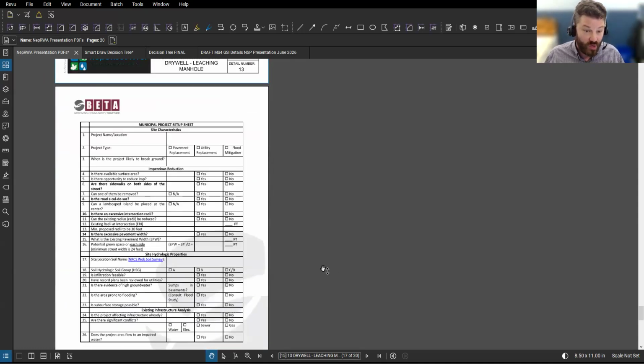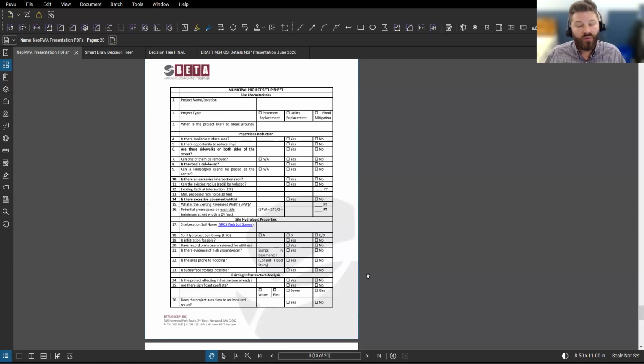We also, as part of this process, wanted a way at the beginning, it's important for the streamline of this, to get out in front of the project. I spoke to some members of the DPW, and they say for certain municipalities, the lead time between construction and when they first know about the road can be around February, at least the ones that I spoke to, and then they would start to bid March and April, and then they start to construct over the summer.